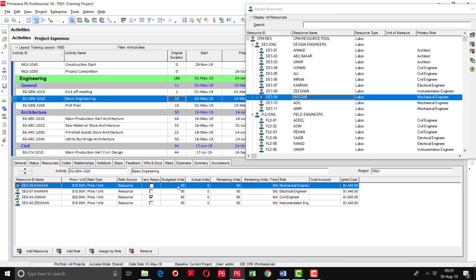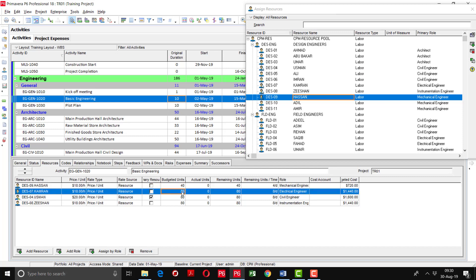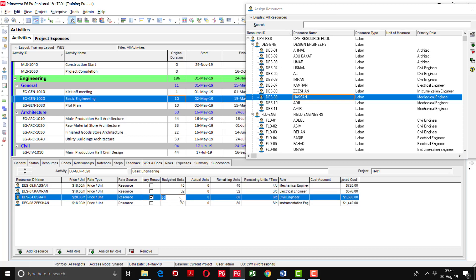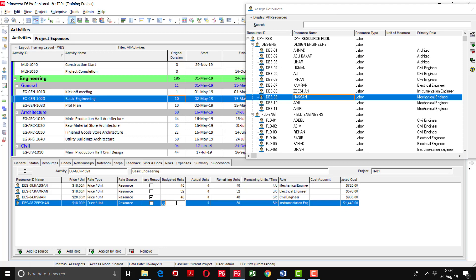We have to modify these budgeted units. For example, Hassan is going to work for 40 hours, Kamran is working for 32 hours for this activity, Usman is going to work for 48 hours, and Zeeshan is working for 32 hours. In this way, I will add the budgeted units for the activities.